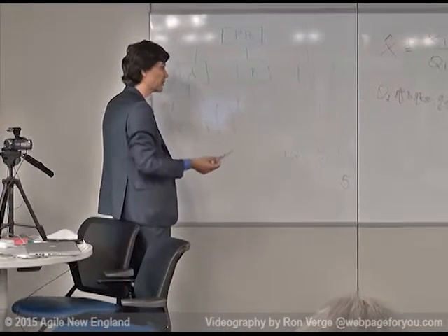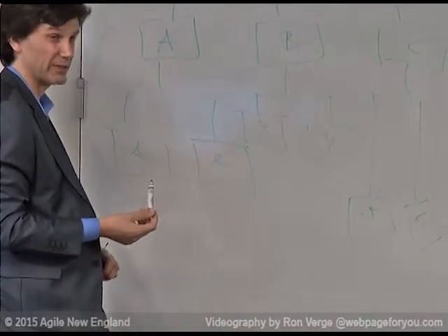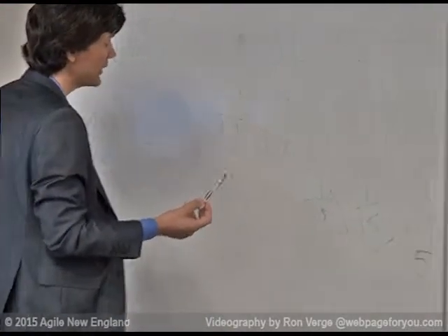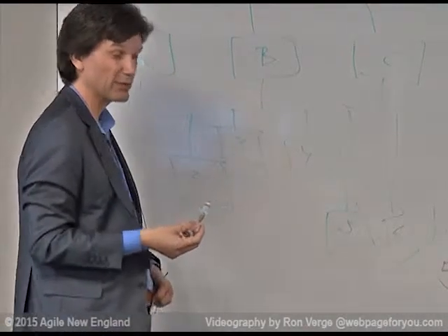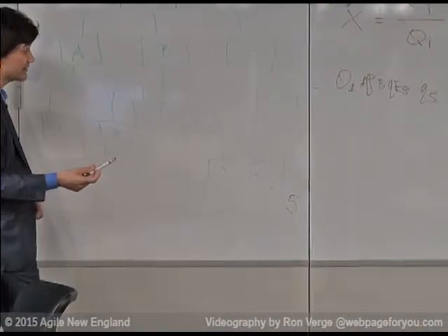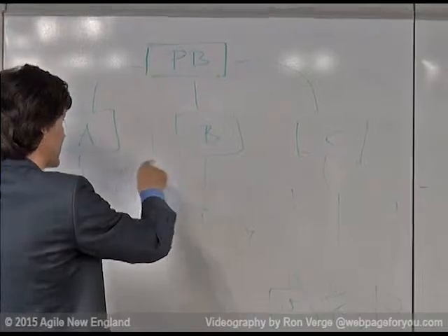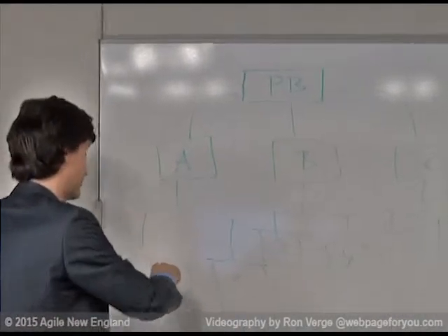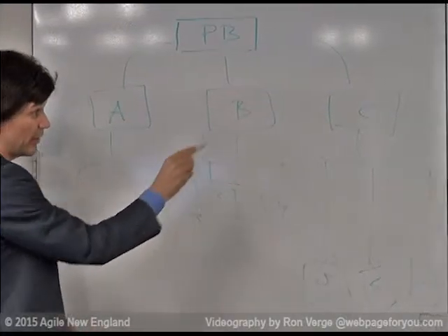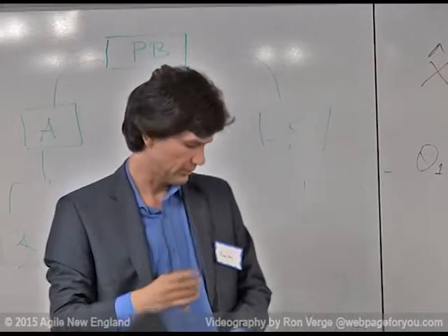Usually, even for a very simple branching system like this product backlog, I do between 7 and 12 estimates. I'll show you the next one. This one estimate doesn't work for us. We have to have at least 7, so that we can create an average and then see the number of story points in the backlog. The next estimate is the same: we pick at random one of the epics, analyze it, then at random pick one of the user stories from the epic, and using the same formula we arrive at another estimate.